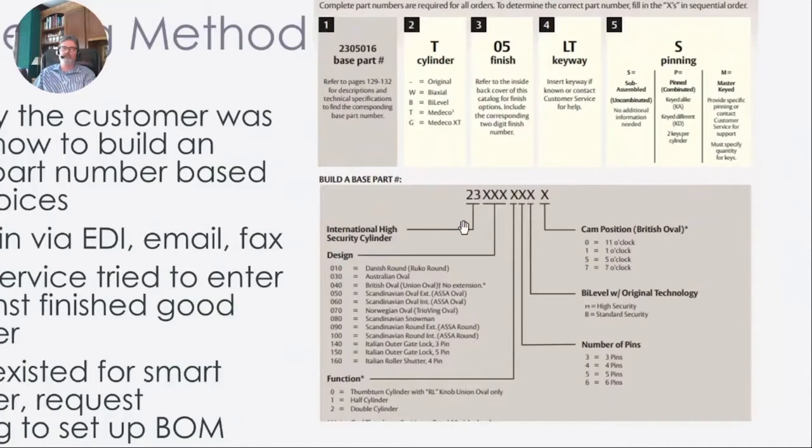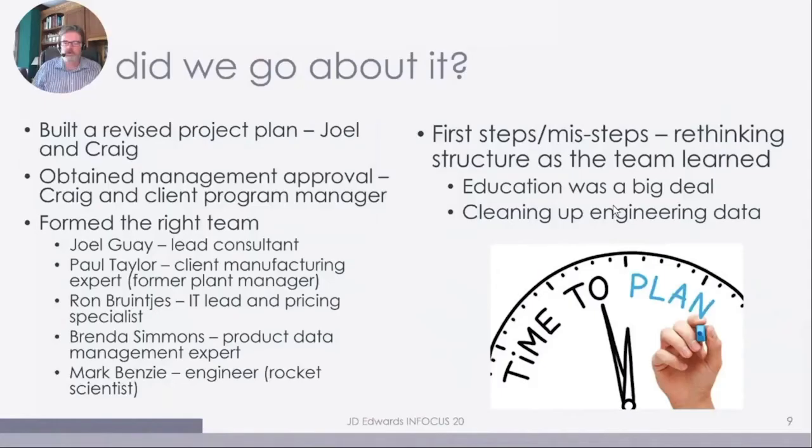So we had to change the plan. And as the project manager, I had to gather the data, revise the plan, and go to management and say, you know what, it's worth this effort, but we're going to need a team, and there's going to be some more effort to implement. But once you get live, the process is going to be easier. We're going to describe that process to you. So my job was to get management approval.